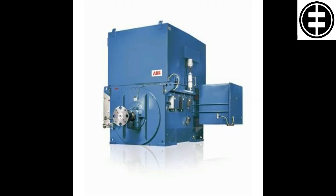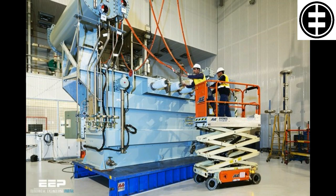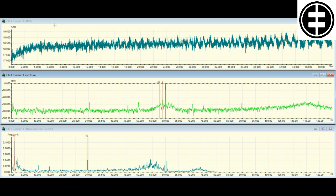Many manufacturers provide recommendations for condition monitoring of their motors and generators. They recommend that the condition of the windings is monitored regularly, and can install coupling capacitors in the main terminal box to enable periodic offline or even online PD measurements. To establish a basis for trending PD measurements, manufacturers can perform fingerprint measurements on new motors and generators as part of the factory acceptance testing. However, it is recommended that a new fingerprint measurement is taken after commissioning because PD activity on site can vary significantly from the activity level measured during FAT.